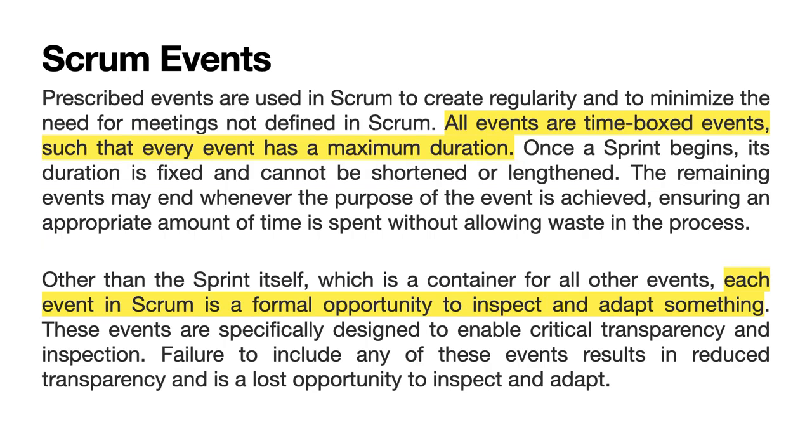Scrum events. Prescribed events are used in Scrum to create regularity and to minimize the need for meetings not defined in Scrum. All events are time-boxed events, such that every event has a maximum duration. Once a sprint begins, its duration is fixed and cannot be shortened or lengthened. The remaining events may end whenever the purpose of the event is achieved, ensuring an appropriate amount of time is spent without allowing waste in the process.